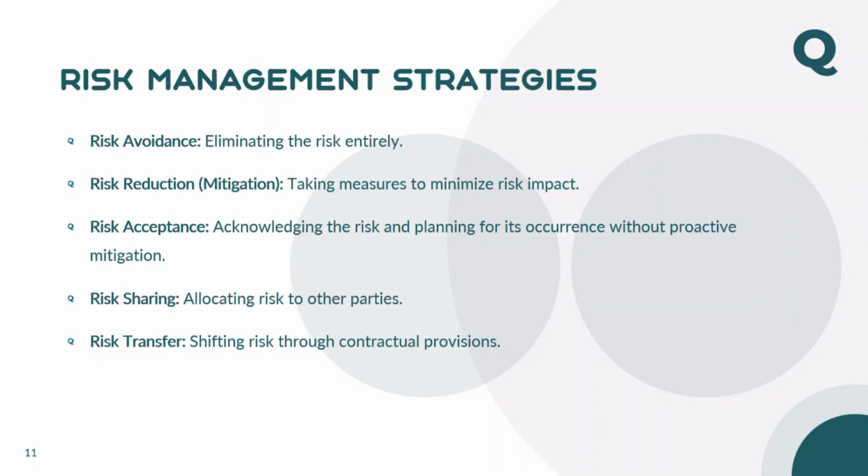When it is risk transfer, basically you are completely transferring the risk to the person who can handle it in the best way. In a similar example from my experience, where the employer will have a better upper hand in getting clearance of the goods, you can tell the employer, you take the responsibility because I'm transferring the risk to you. I'm not pricing the risk, I'm transferring the risk to you, because risk always has to be given to the person who can handle it in a better way.